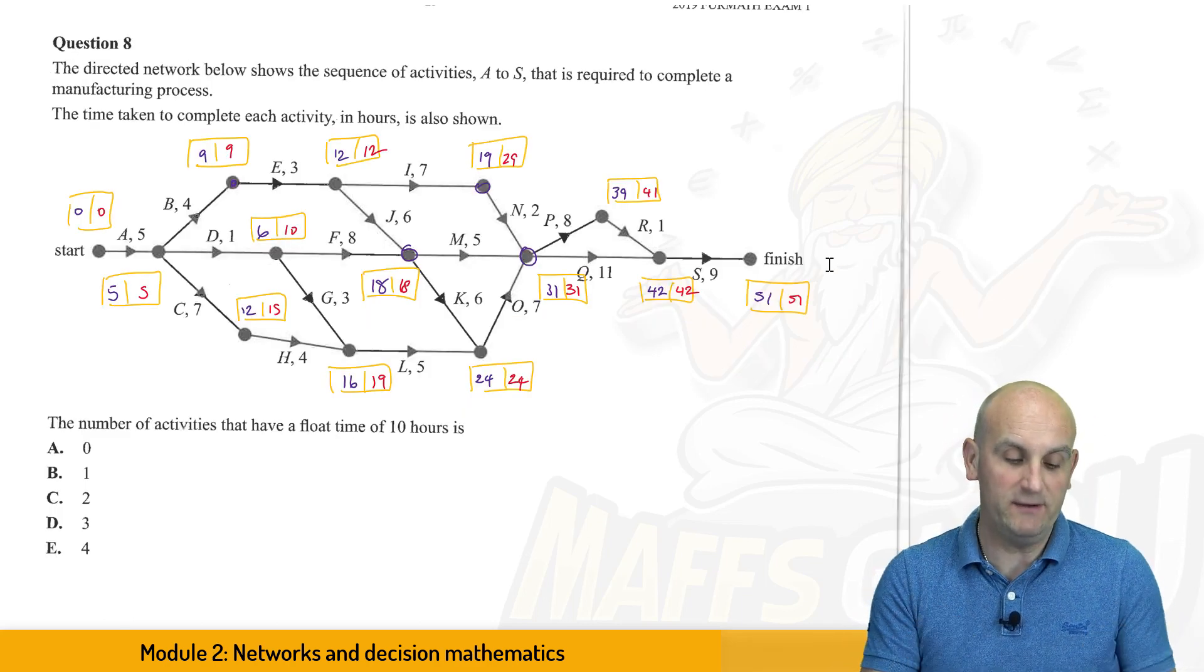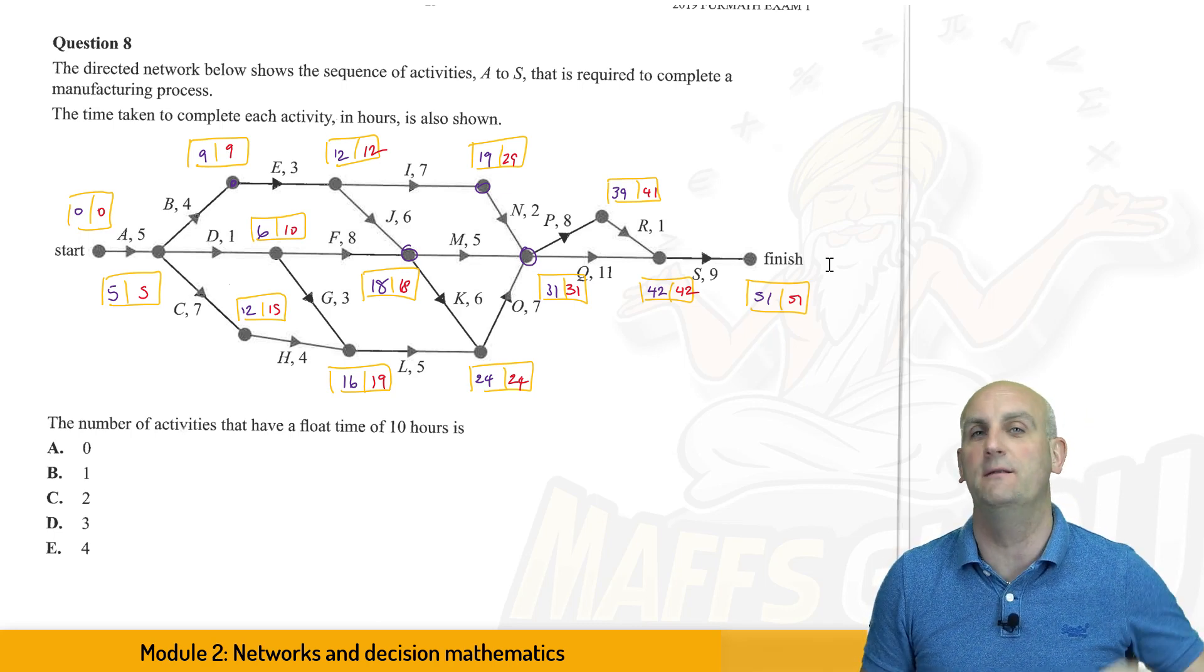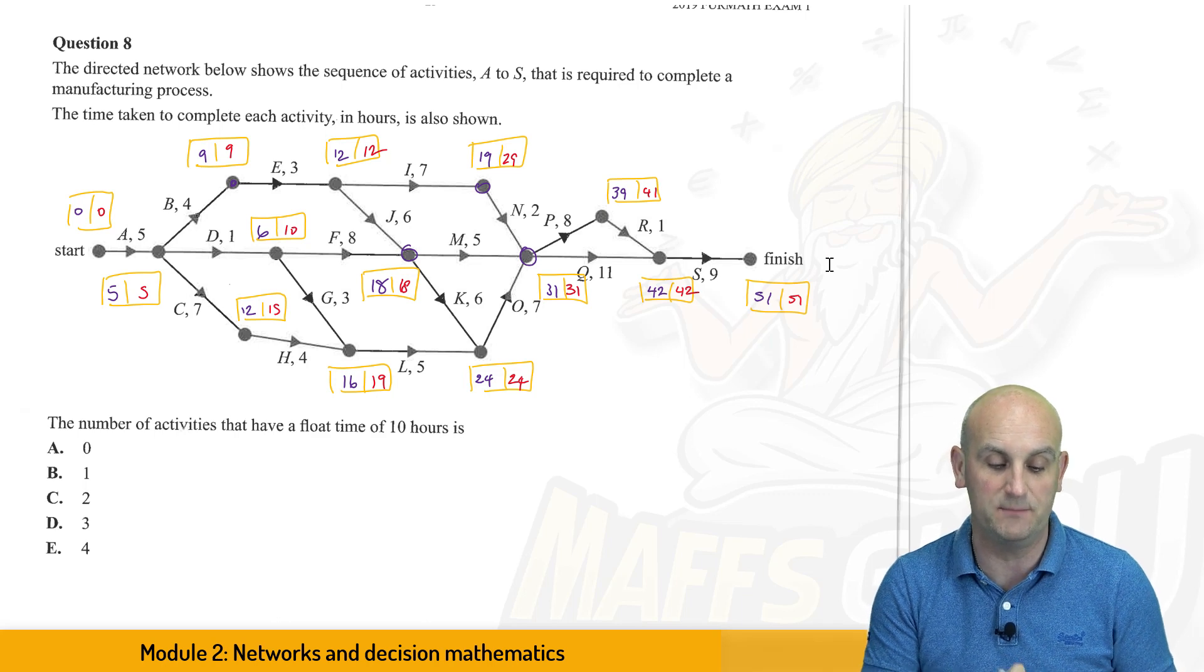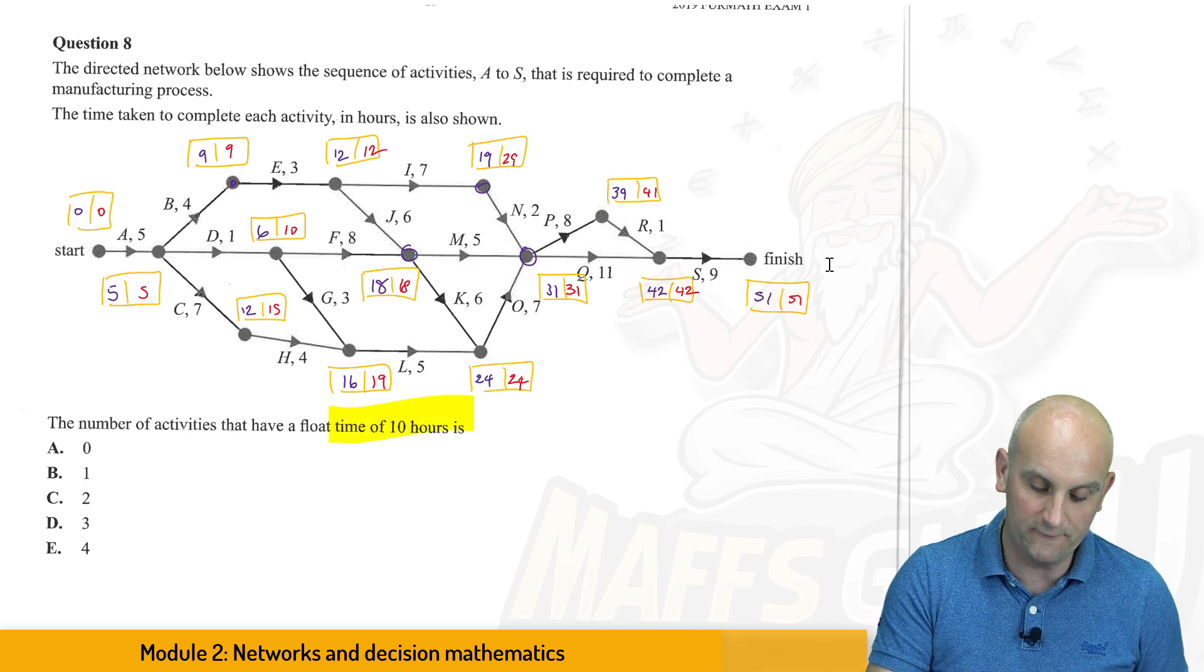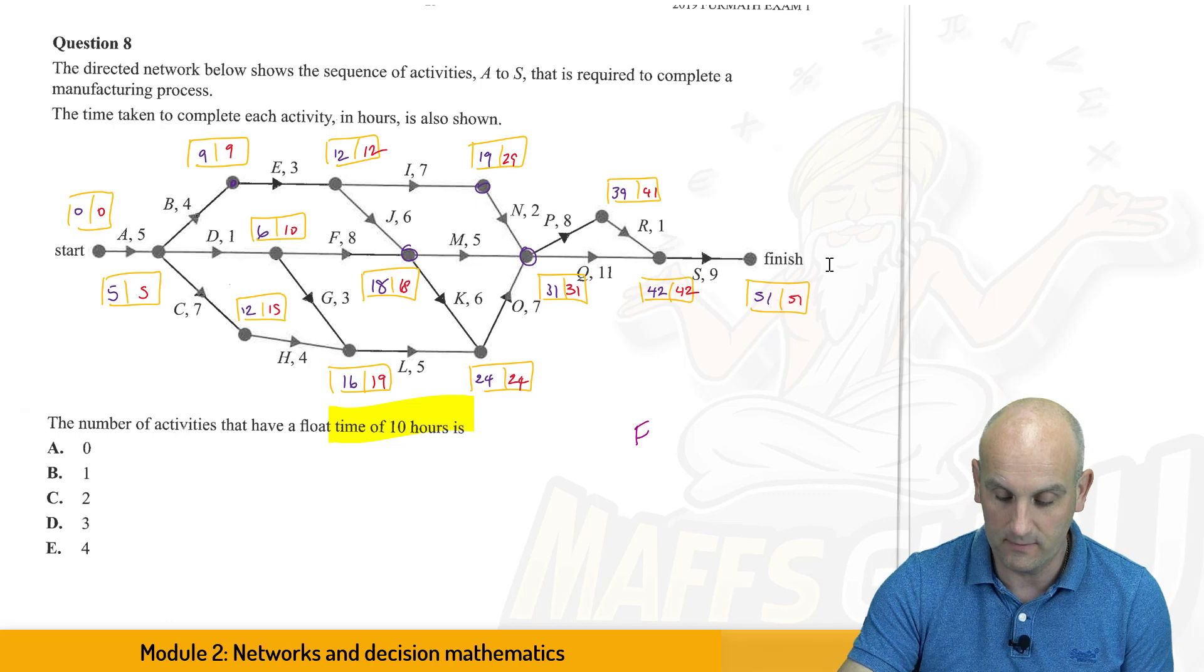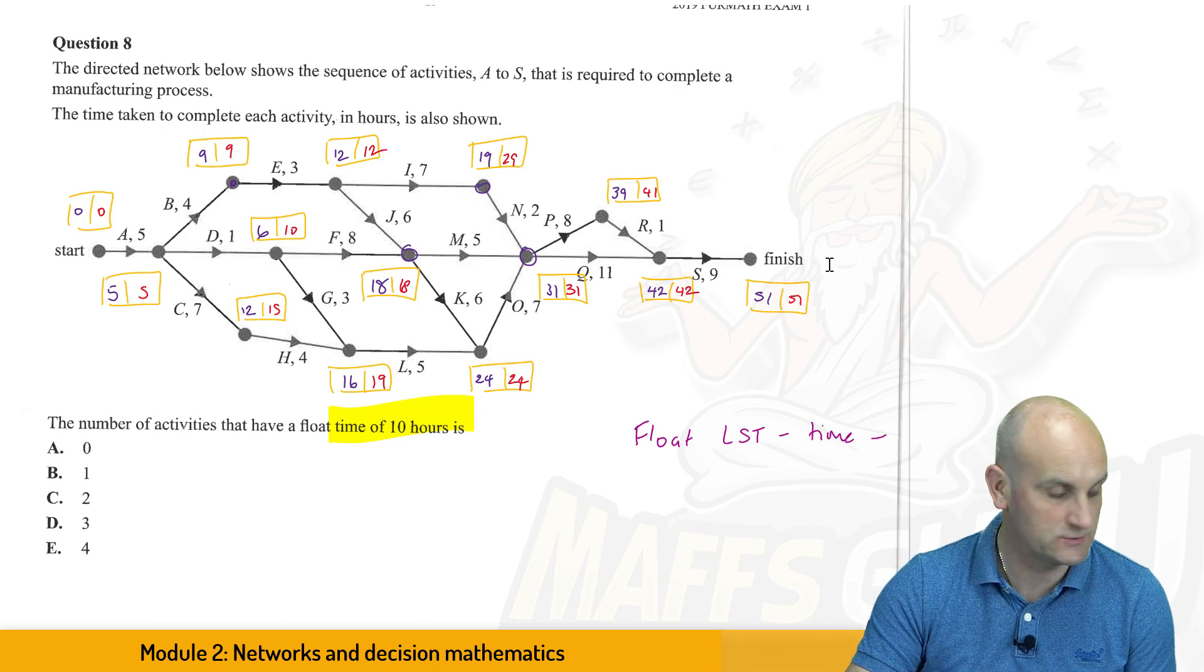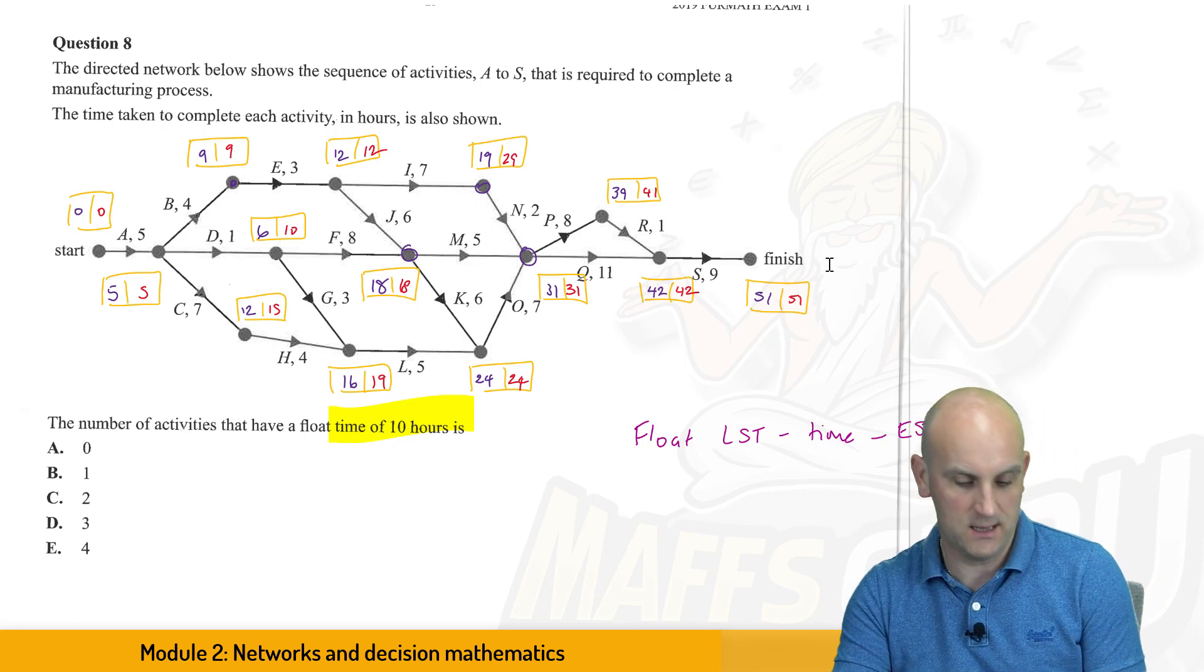In question number eight, we're given a directed network showing a sequence of activities A to S. Now, as you can see, I've already filled in my earliest and latest start times, and it says A to S is required to complete a manufacturing process. The time taken to complete each activity in hours is shown, and I filled it in. And it says the number of activities that have a float time of 10 is. Now, what we've got to remember is our float time is given by the latest starting time minus the time it takes for the activity, and subtract from that the earliest starting time of the activity.